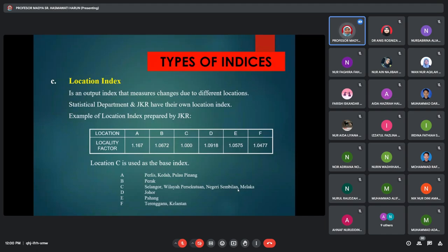For example, one of my students did a thesis about building material prices and locality. She did it in Pasir Gudang, Johor, where there are many oil and gas projects. Interestingly, the prices there were rather higher than in Shah Alam or the Federal Territory, because bringing all those building materials into a remote area involves tons of lorries.